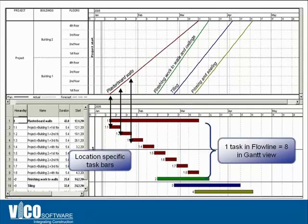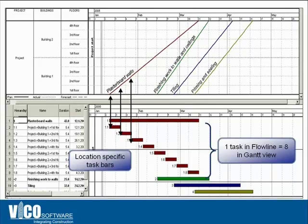In the Gantt chart view, for every single location in an activity-based schedule, you have to create a separate task. For example, you have plastering for drywall on the first floor, second floor, and so on up to the eighth floor — every single activity for each location is a different bar. In the Flowline view, however, you only have one line representing one crew, the drywall crew, across several locations. So instead of eight tasks, you only have one to manipulate and define.